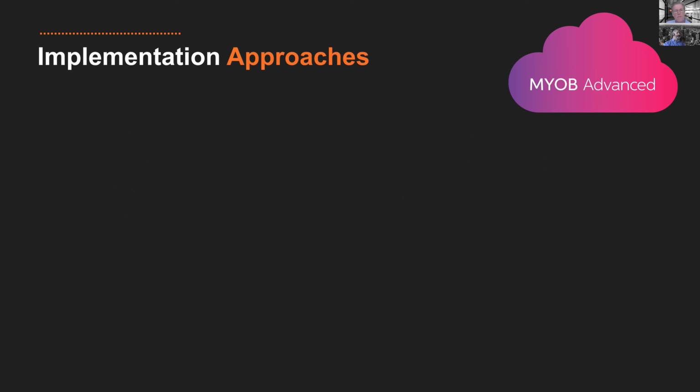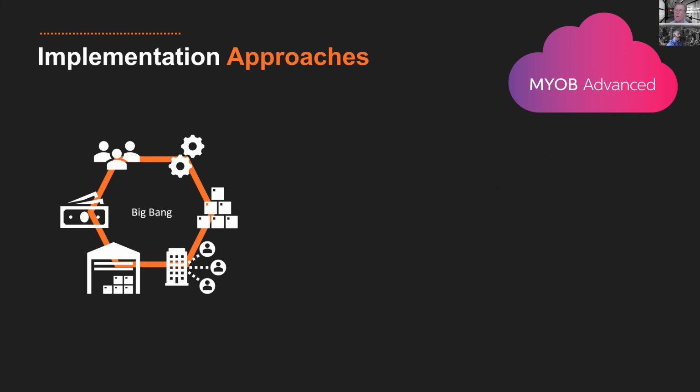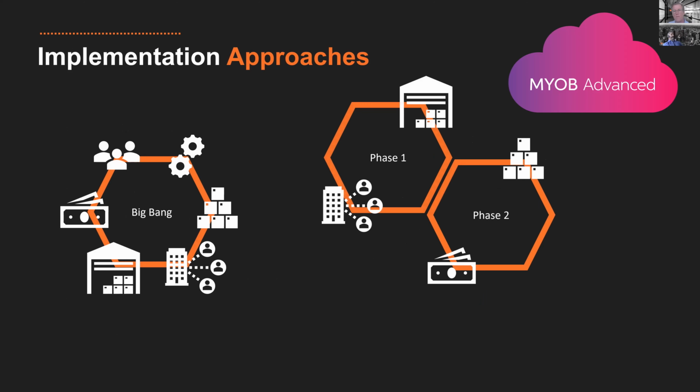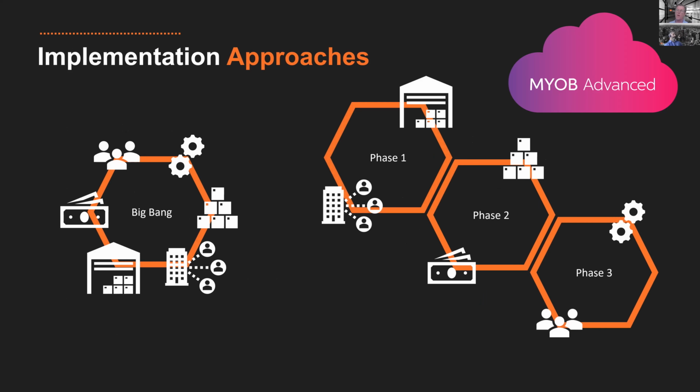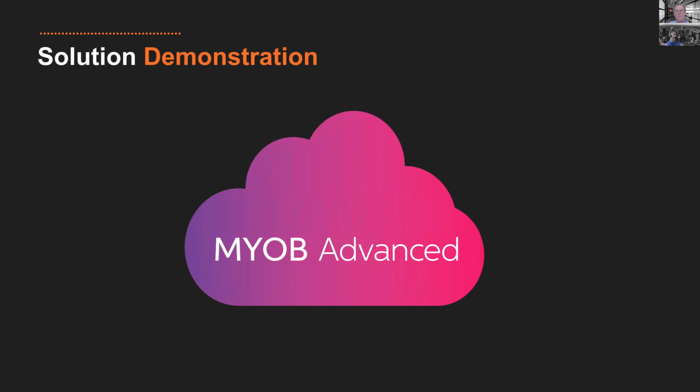There are multiple ERP implementation processes. Of course, you can have a big bang theory where you're implementing everything together, or you could go for a more phased approach. The phased approach does help with smaller businesses who want to start with a foundation system, a footprint of ERP, and then build out the system over time with the additional functionality that you can then add in later phases. So you start with this core foundation system, and then you build out the additional applications and elements that you want. Several of those elements we spoke about today don't have to be implemented day one. They can be added as your business grows and as you require additional functions and features.